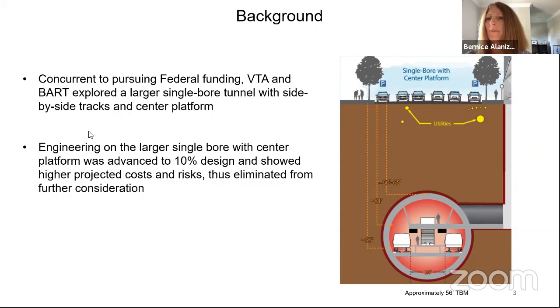As Nuria stated, when we reached that 10% design level, it became apparent that for that larger bore tunnel, the costs were exceeding our funding availability. And as Nuria also mentioned, we did get feedback from tunneling experts and those at our forum earlier this year that the project posed more risk and it might not have the level of competition that can further reduce the bids. So we began looking at what other options we may have.